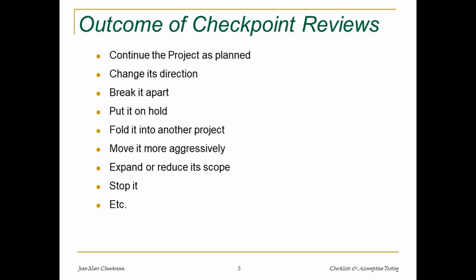And by the way, team meetings or checkpoints should be scheduled ahead of time in a regular fashion, and you can always cancel one if there is nothing to discuss. One thing that does not work well is to say we will call a meeting when we need to have one. No, have a schedule of meetings. Let's say once a week on Monday from 10 to 12. And if this particular Monday there is nothing to discuss, cancel the meeting, but have it on the agenda on a regular basis. Okay.